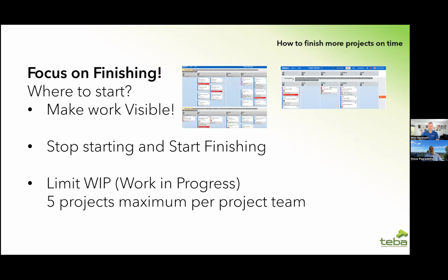All of us are in the industry, and we know that engineers leave stuff unfinished. The biggest issue we had was projects were lingering due to documentation, right? Little things like that. Or 3 little items we promised the client that we would do, and they just dragged on and dragged on. So we said, stop, which ones can we finish quickly? Bang, bang, bang, let's finish those. And eventually, and it took a couple of months, we got it under 5. And then from then on, it's been 5. That's it. We try to do more than 5, something has to stop.